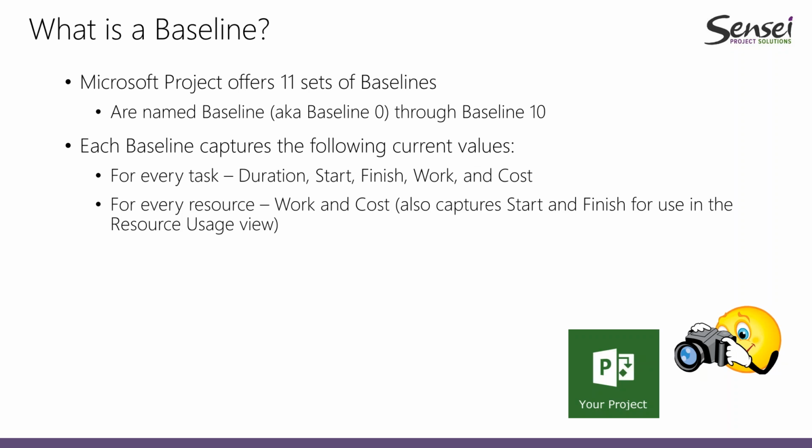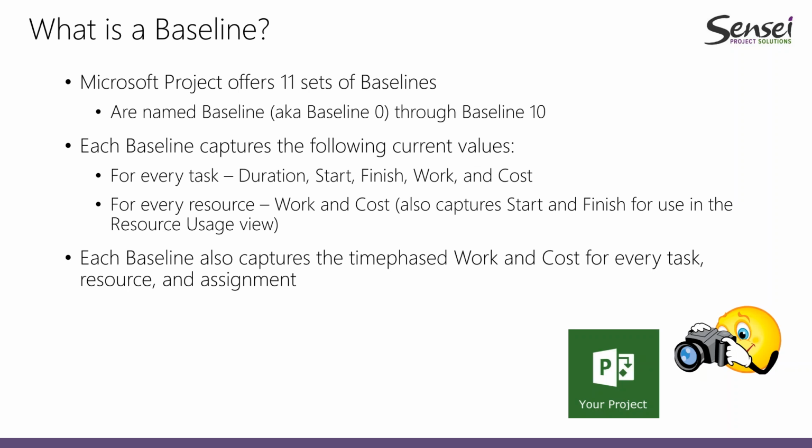For resources, what is captured is the work and cost information. For assignments, the baseline also captures time-phased information about work and cost. So it's recorded for every task, every resource, and every assignment, so that we can see how the information is moving forward during the time frame of the project.